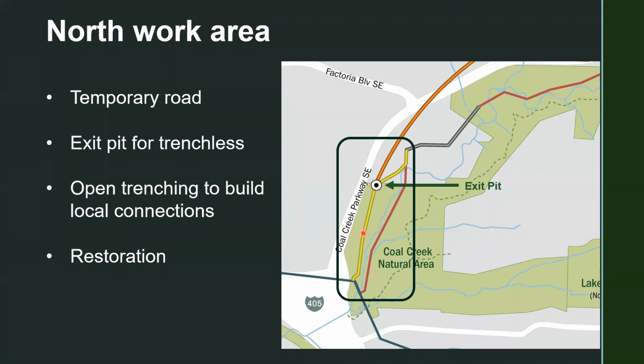It's important to note that about half of this open cut will be on an existing access road in the area. We will need to build a temporary access road from this portion, about where my pointer is. And all of this will be restored, and I'll talk more about that in a few slides. This is all going to be work that's off of the road, with the exception of some truck traffic in and out of the access road right here. So traffic impacts will be comparatively small. There will be temporary environmental impacts in this area, and I'll talk about restoration in a few slides here.